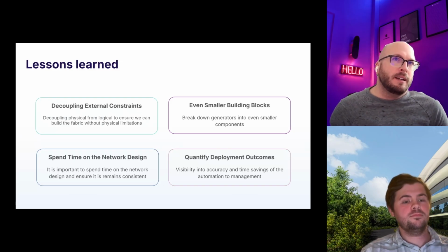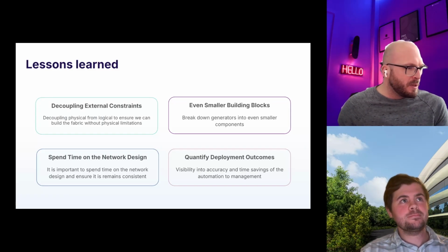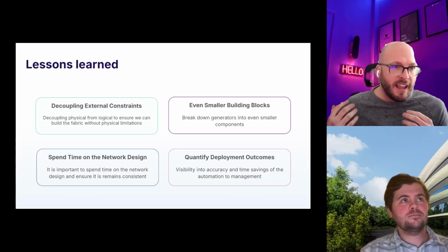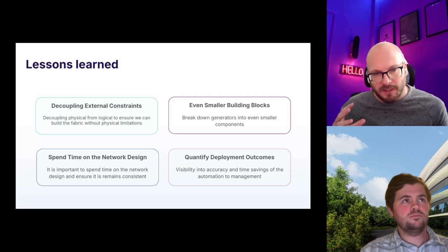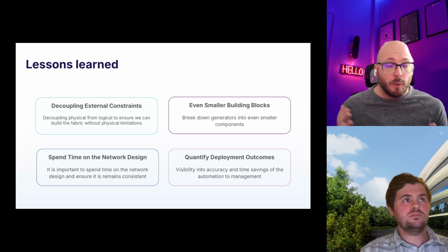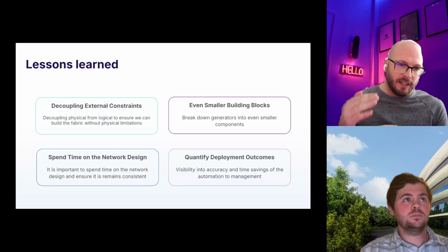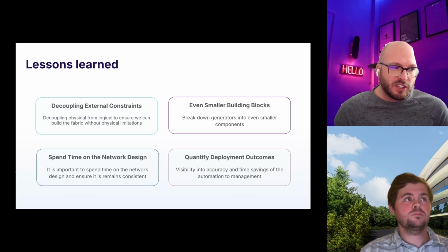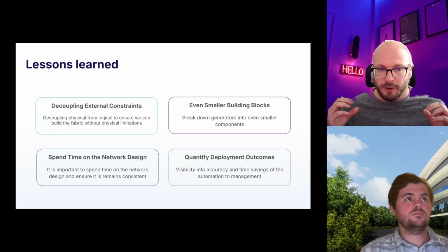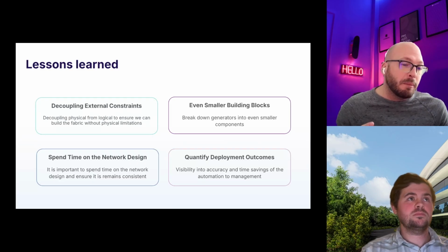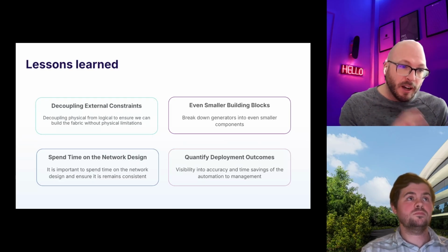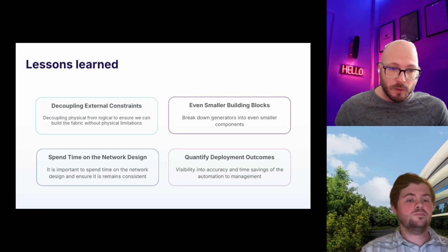Ultimately, what ended up happening was it was kind of complex with some of those physical things. I think you run into that a lot. Having to generate the cabling plan, there were different ways we wanted to handle it, and with the deliverables, we had to handle it in a very sequential way. So what we learned was we need to decouple this from the physical. Let's generate the logical components in the fabric portions, and then in a separate process, we'll couple those back into the physical constraints.